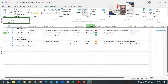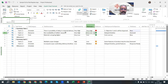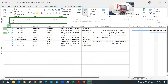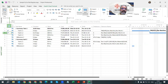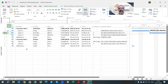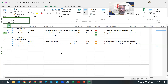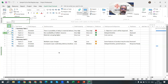This is your risk register, which helps you capture risks at the task level. You can add multiple risks since these fields are free text. I've created a custom view, and from this view we can create reports or attach them to built-in reports. When you share your project plan, you can share the risk register within the same MPP file — no need to juggle between MS Project for scheduling and Excel or another tool for the risk register.